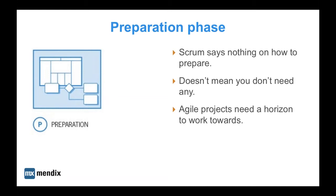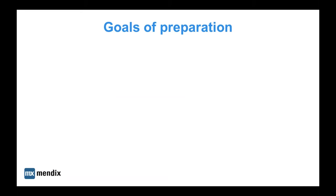How do we know if we've hit the sweet spot of preparation effort? Having a clear idea of the goals of the preparation phase can help. We're ready to start a project when: we're ready to deliver some business value; we have a clear vision and know what the horizon entails; we can do some high-level forecasting; and we have just enough detail in our preparation to start the first sprint.